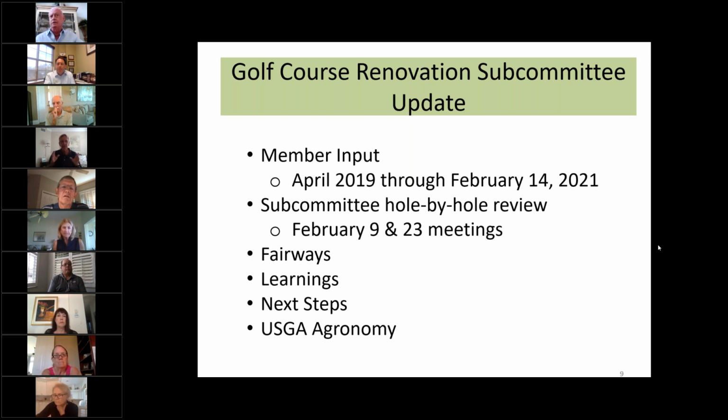I don't think you have to reserve for that stacked rock. You might have to come in and re-paint or re-cement some places now and then, but it is not something that in 10 years or 15 years you take out and replace, which you do with wooden bulkheads.